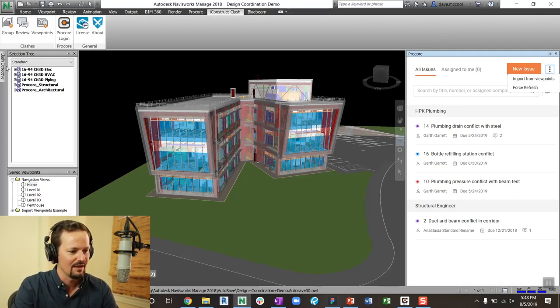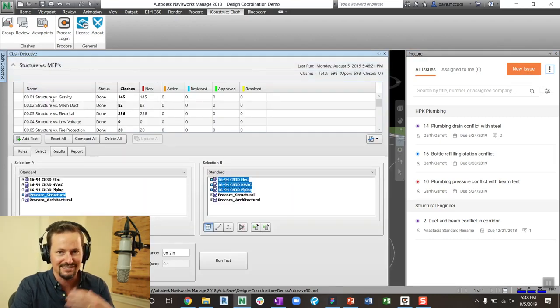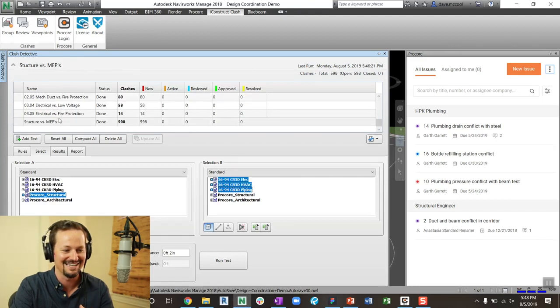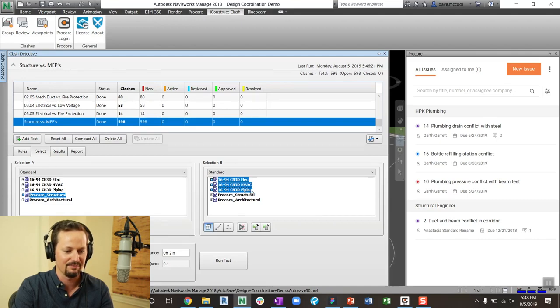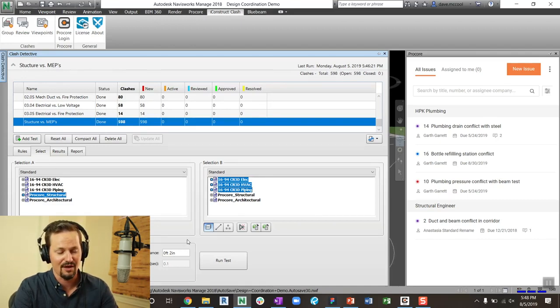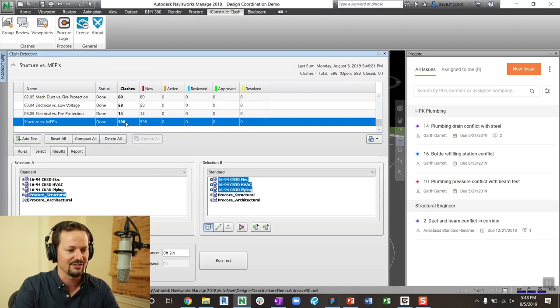So what I've done is, I prefer search sets and priority systems. But for the sake of this example today, I made one clash test that was MEPs versus structure. So structure versus all the MEPs and two inches of clearance for your Monocoat. And there's about 600 clashes.